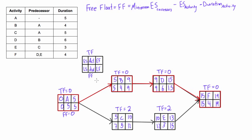One important rule: free float always has to be less than or equal to total float. So if you've already identified the critical path — all activities with a total float of zero — you can immediately fill in their free floats as zero as well, or you can just double-check by calculation.